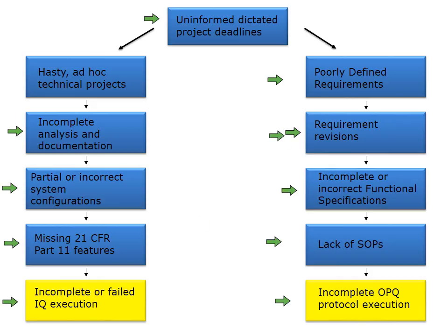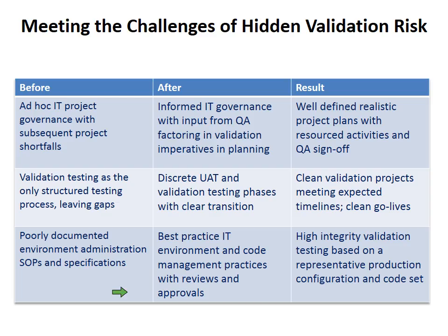And if no one can hand us a set of requirements or allow us to develop a set of requirements based on really solid business input and IT insight into what's the nature of the system and the architecture and the configuration, we're going to have a very hard time completing the validation in a timely manner. The system is in flux, and the business thinking about how to use the system is in flux. We see scope changes happening all the time just before validation because of issues on the technical side, partners, etc. So this all adds to cost and time delays, and are primarily avoidable in many cases. You can't avoid everything, but most of them tend to have been avoidable.